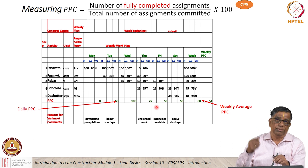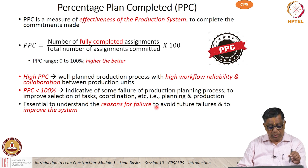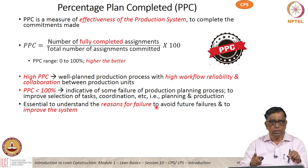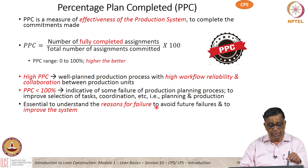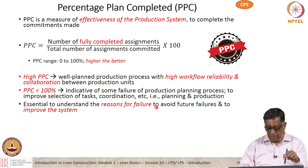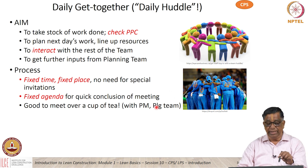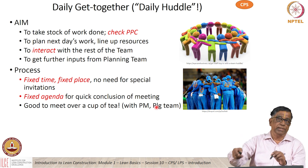That is something I need to analyze and improve. A very good PPC means the work is well planned, well coordinated, and you are generally keeping your promises. A PPC less than 100 means there are a number of things wrong — we need to find out why and keep improving ourselves. So the reasons for failure are what we need to identify through root cause analysis. The planning manager goes around to the various sites, or at the end of the day all people come together at the daily huddle.